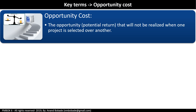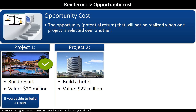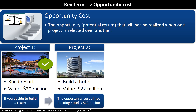Opportunity cost is the cost given up by selecting one project over another — it is the cost of the project that was not chosen. For example, you have two projects: Project 1 costs $20 million to build a resort, and Project 2 costs $22 million to build a hotel. If you decide to build the resort, the opportunity cost of not building the hotel is $22 million.